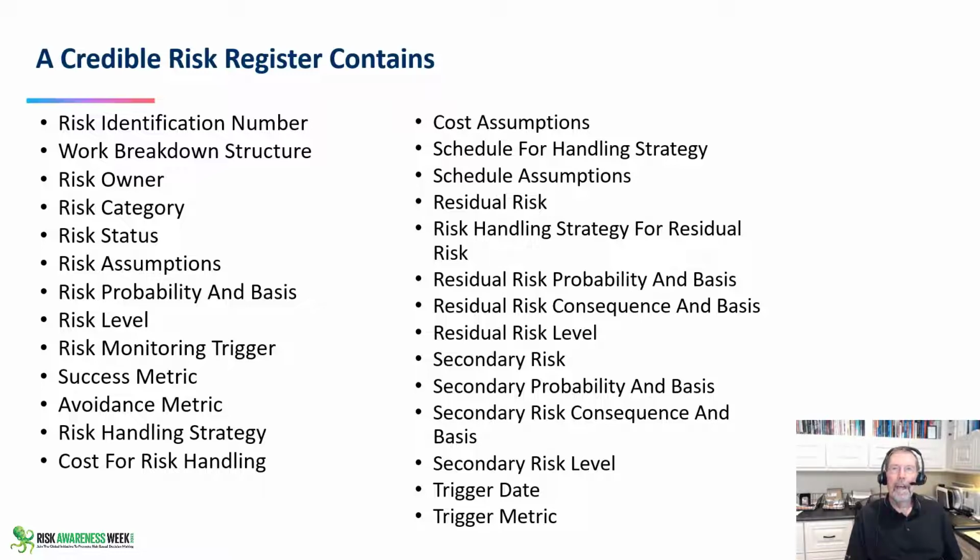So when you have those items in the risk register, then what we can start doing is asking ourselves, which ones are aleatory and which ones are epistemic? What is the category? What is the status? What are the success metrics for the risks? What do we have metrics to avoid things? Are all these risks aleatory, naturally varying, or are they epistemic, probabilistic, where I can pay money to make them go down? So that's the question that we need to ask with the risk register.